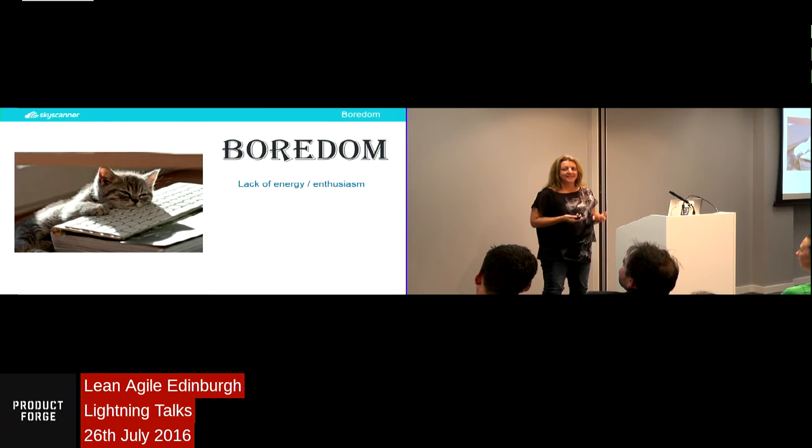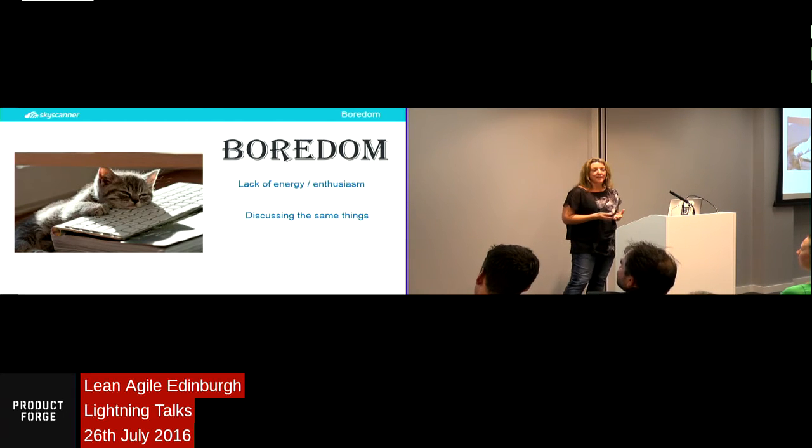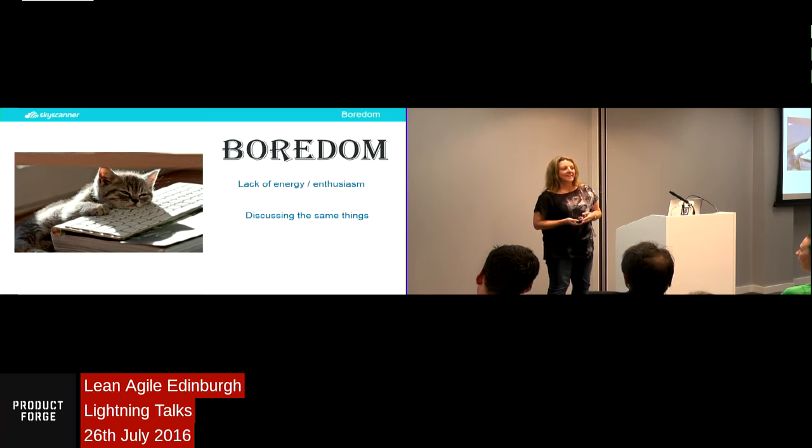So just mix it up. There are so many different formats you can use. You're probably familiar with some of these ones. You know, stop, start, continue, repeat, avoid. What slows us down, what speeds us up. The 4 L's, which is something like loved, lacked, learned and longed for.